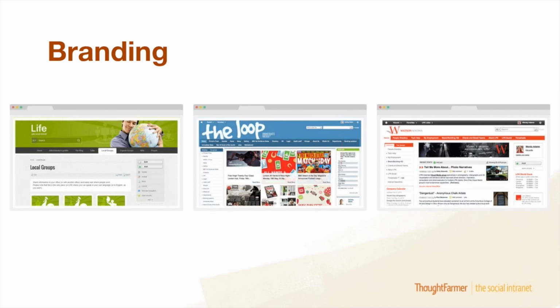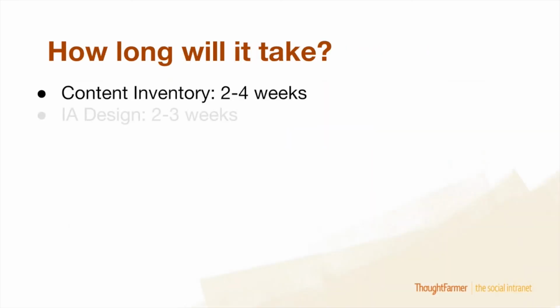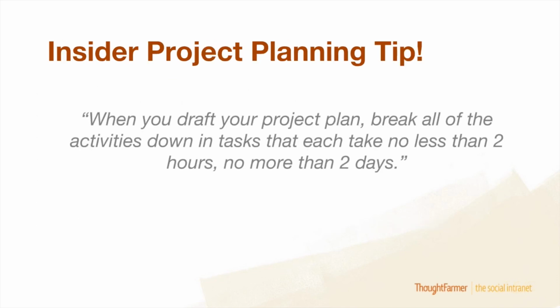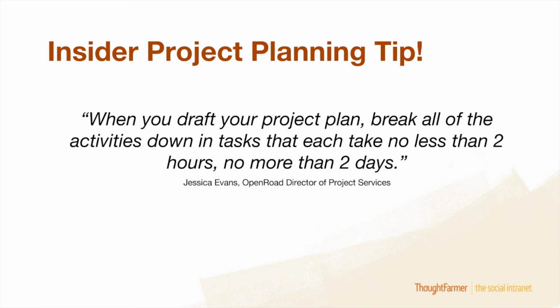Oh boy, no, I should go back to the slide of Jessica and her amazing advice. There we go. When you draft your project plan, break all of the activities down into tasks that are no less than 2 hours, no more than 2 days. Amazing. Thank you, Jessica. That would be my advice as well. And yeah, go in with your eyes open, I think is my major advice, right? Be prepared, be planned, be organized. That is a great place to be when you start off this project.